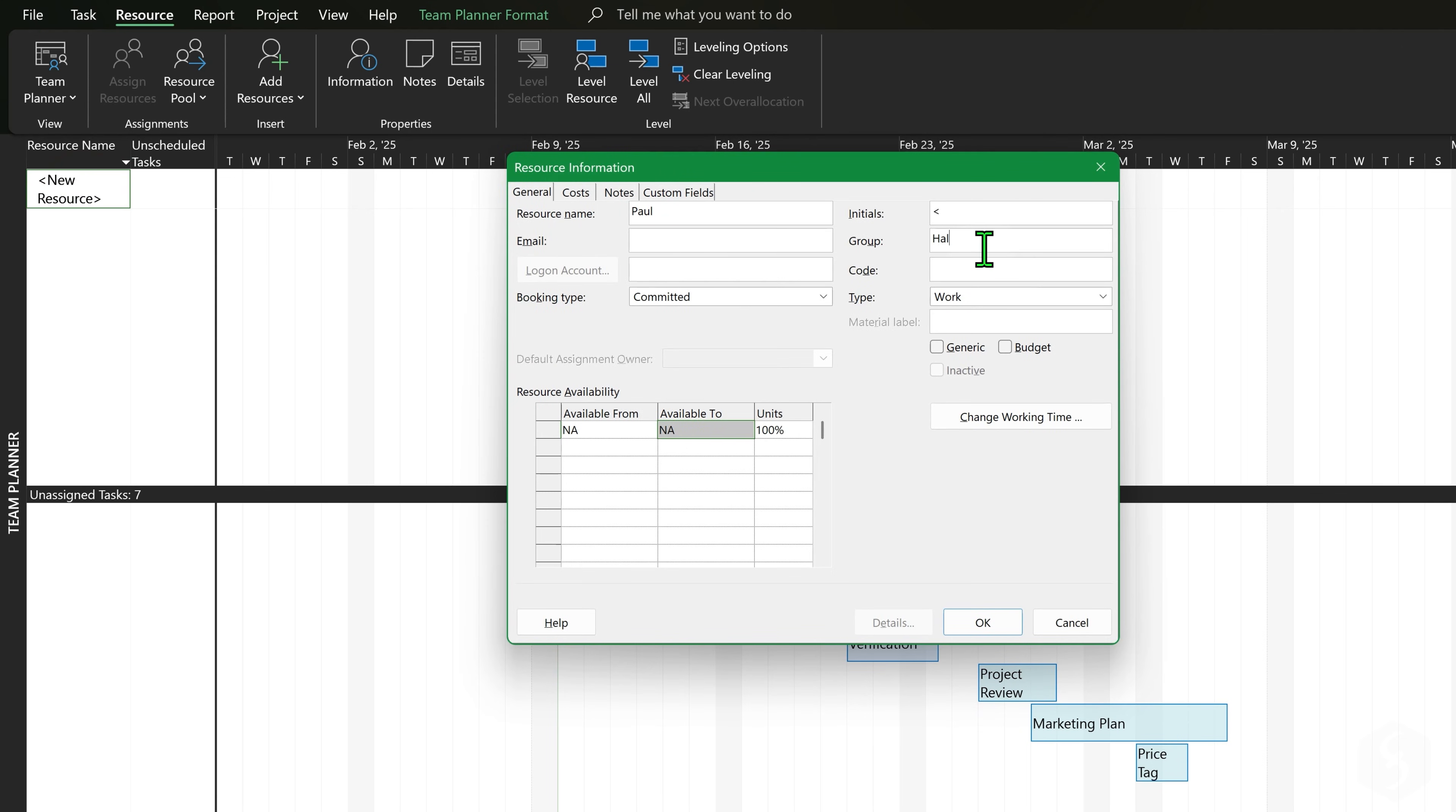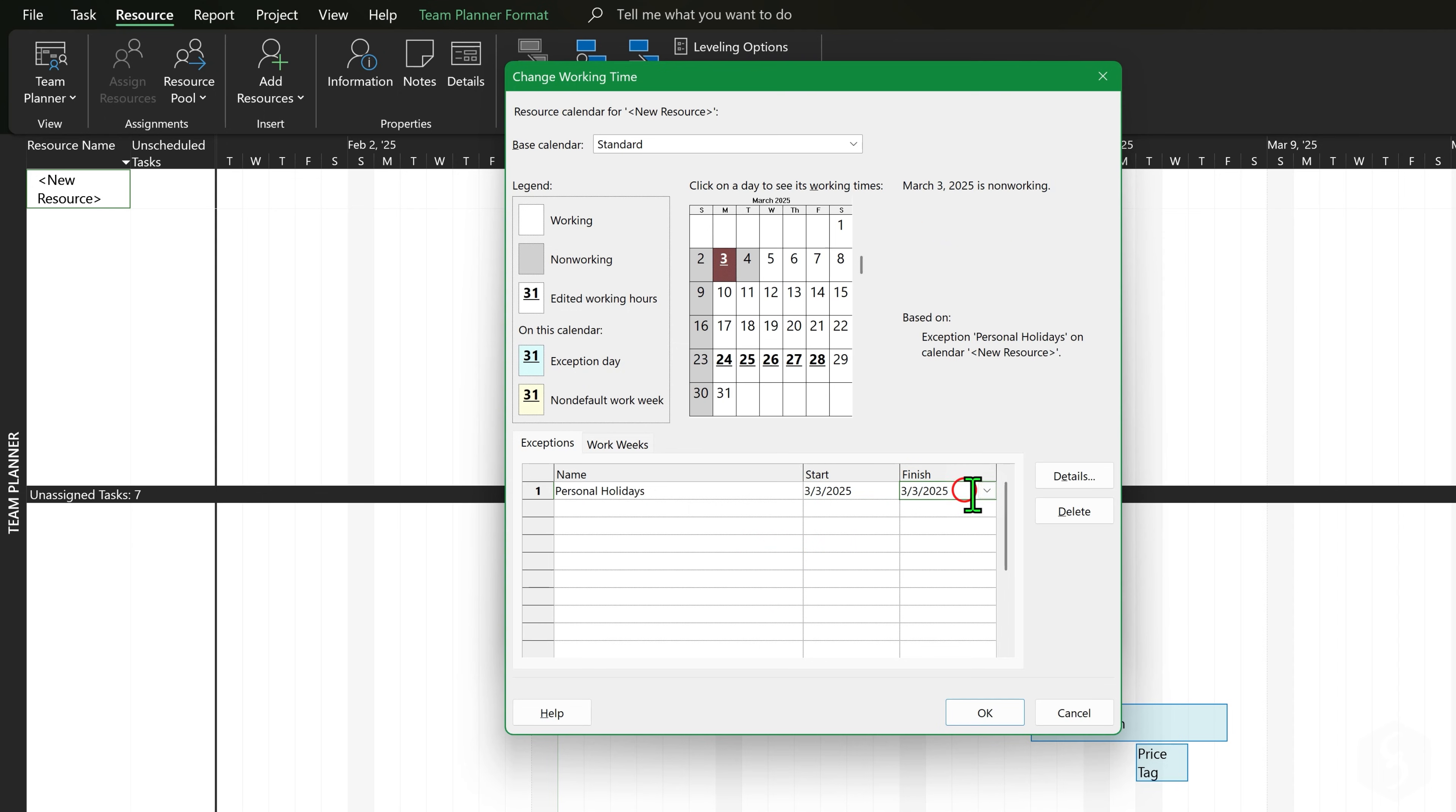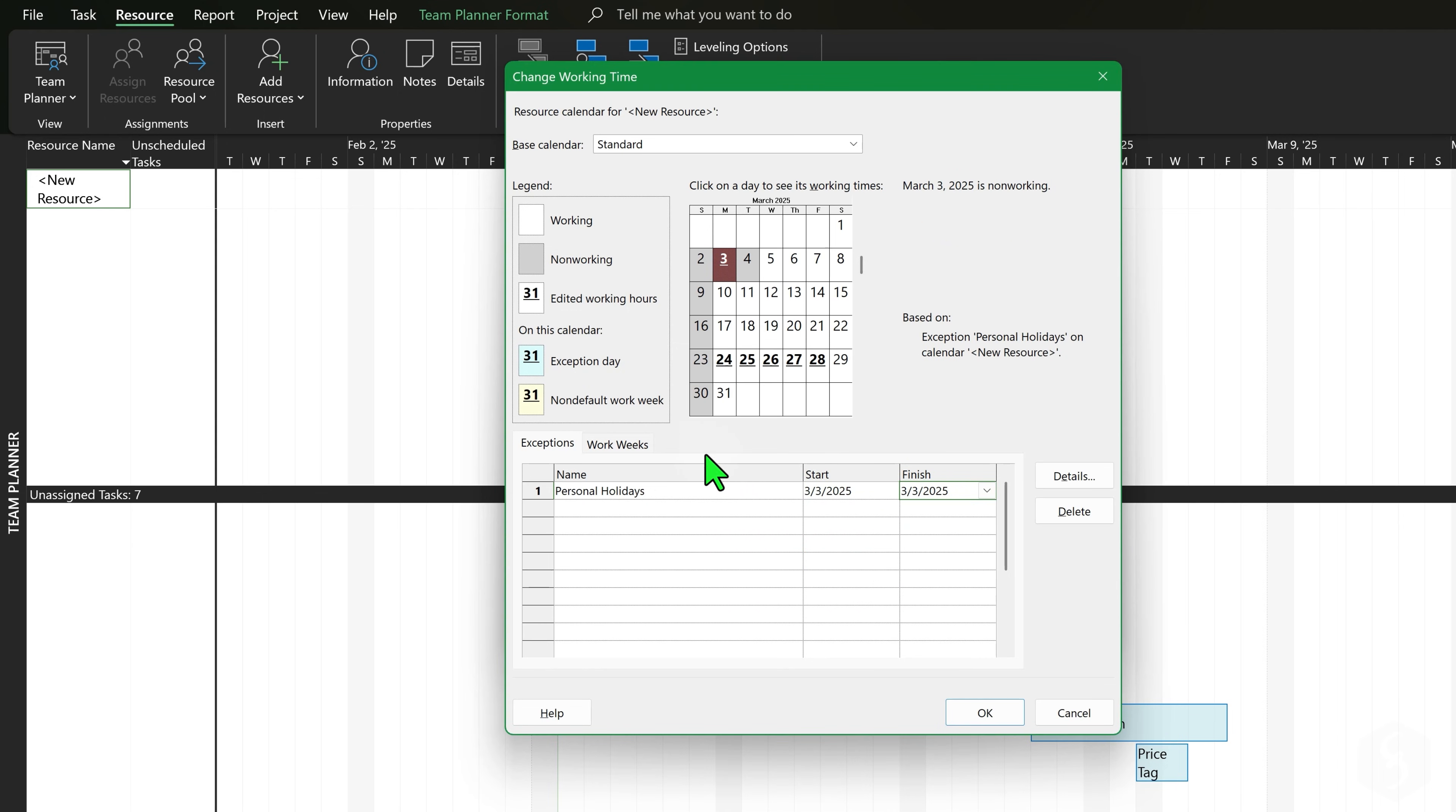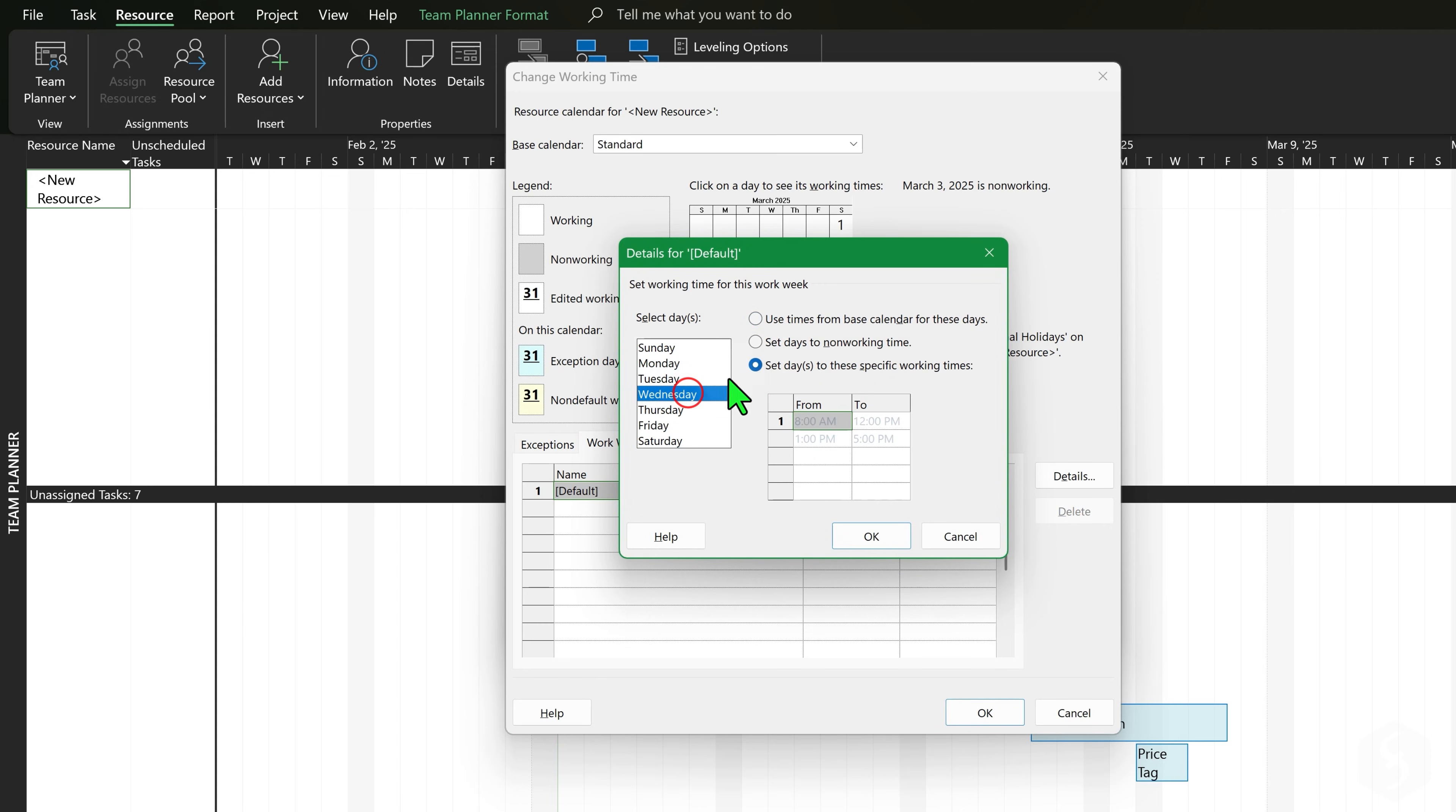You can also go to Change Working Time to define holidays on exceptions and default working days and hours on work weeks. These rules are applied only to such resource, overriding the general project times.